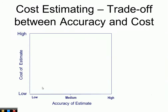It's important to understand the trade-off between accuracy and cost of estimation. The cost of an estimate can be very low, but then accuracy is also low. When we want medium accuracy, we can achieve it at a relatively low cost. But high accuracy estimates require high costs because you need a detailed design for the project.